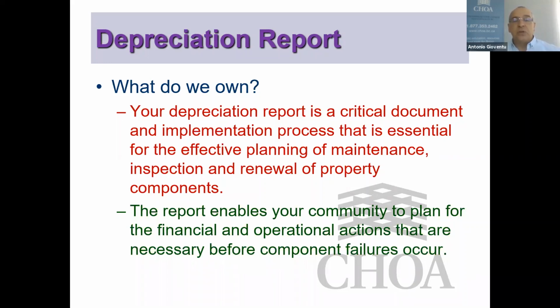So it is only an estimate, but the other part of that is, what are you asking for when you go to a depreciation planner? Are you asking them to estimate costs, including consulting and permits and inflation, up to a factor of give or take 15%? Or are they just looking at the component itself and looking for renewal costs? The additional costs of consultants, building permits, construction costs, those can easily add 15 to 30% to your cost. Likewise, the projection of costs may change dynamically if there is a demand supply problem with a certain type of project.